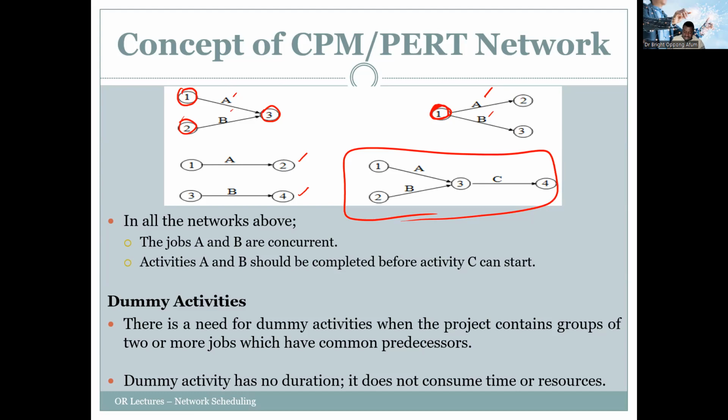What are dummy activities? There is a need for dummy activities when the project contains groups of 2 or more jobs which have common predecessors. So if they all have the same predecessors and also the same successor, then we'll say that there is a need to create a dummy activity. What does that mean? The dummy activity has no duration and it does not consume time.